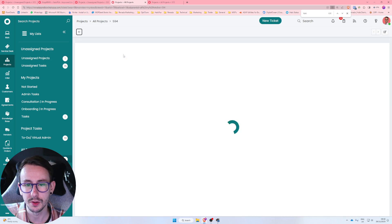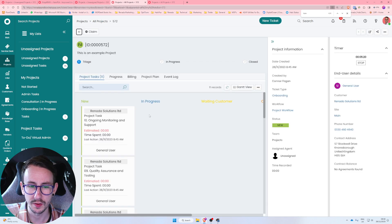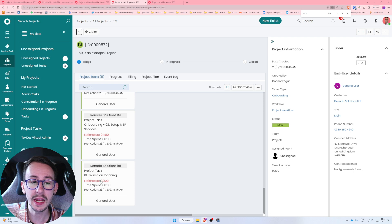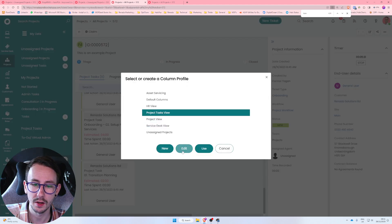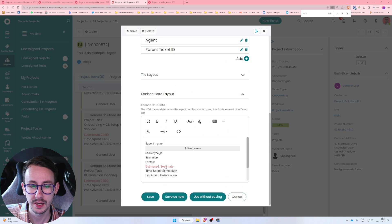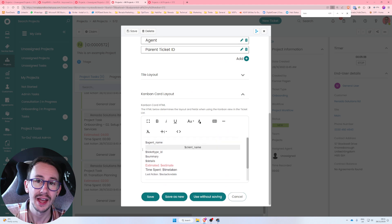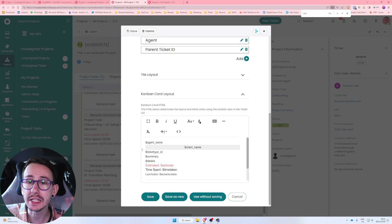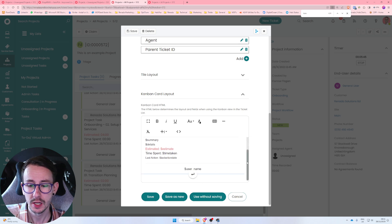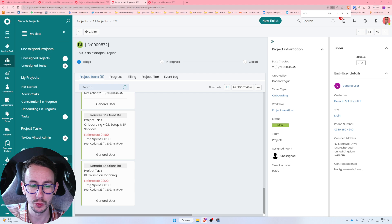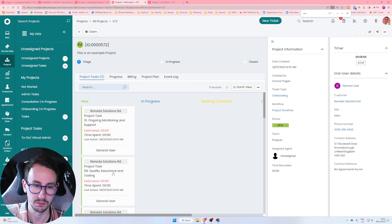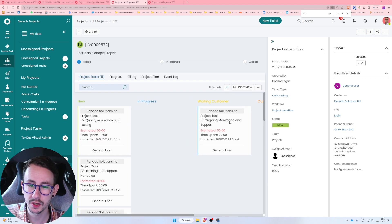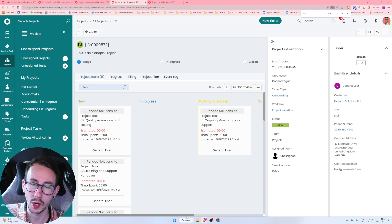The last thing I want to show you is the Kanban view. You can enable it and format the Kanban card — for us we show estimated time, how much time we've spent, what the task is, and when we last did something on it. This means when I load up a project I can quickly see what's new, what's in progress, what's waiting on the customer, how much time we've spent on each task, and where we are in the workflow.